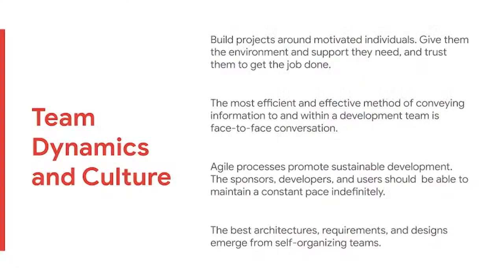A release plan that isn't connected to the team's ability to complete work could be unrealistic and lead to an unsustainable pace for the team. This would violate one of our Agile principles, which states, Agile processes promote sustainable development. The sponsors, developers, and users should be able to maintain a constant pace indefinitely.